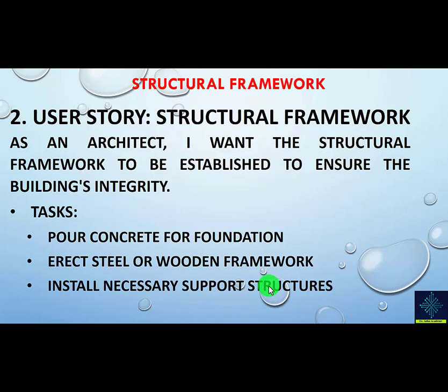Another example would be related to the structural framework. So this is our user story: as an architect, I want the structural framework to be established to ensure the building's integrity. What tasks do we expect? We expect the following tasks: pour concrete for foundation, erect steel or wooden framework, install necessary support structures.